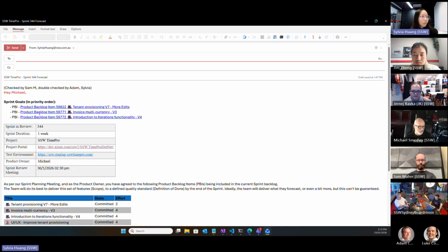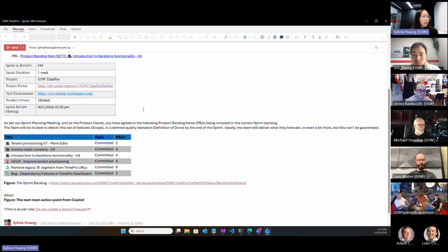So the top priorities are still 3 videos. We are trying to get them done next sprint. And for next sprint, because Jim will be on client work and Joffrey will be on leave, it will just be Sam and I, 2 members working for the sprint, and our capacity is around 24.